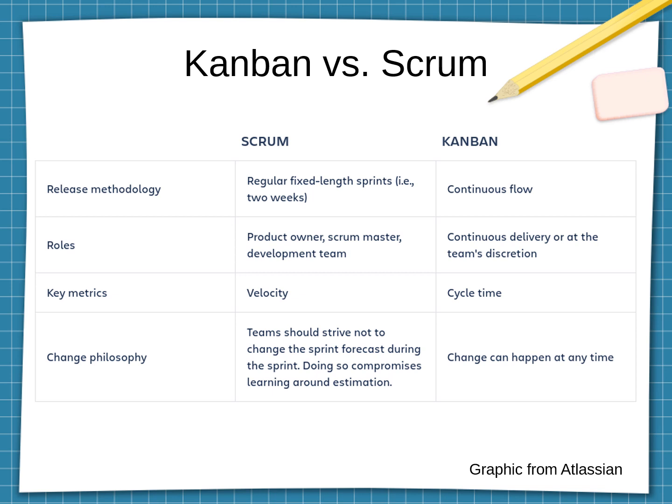Kanban also encourages change in the sense that visualization of workflow can help to identify shortcomings. For example, if the test column consistently has 2 or 3 times the amount of Kanban cards stuck in that swim lane of the workflow, the team may want to think about putting more resources towards those tasks. These are 2 very popular agile methodologies that can be modified in many ways.